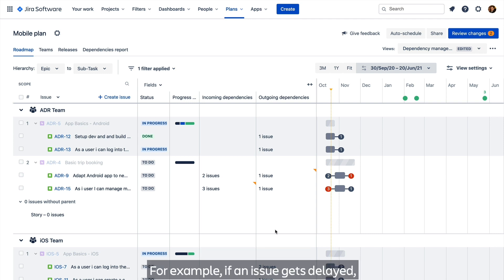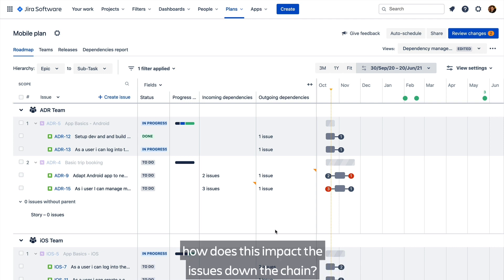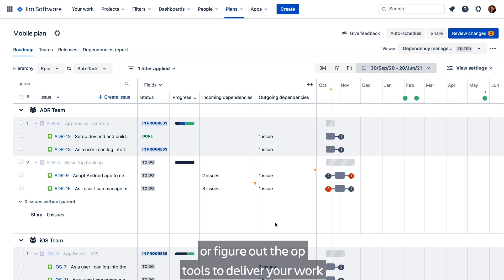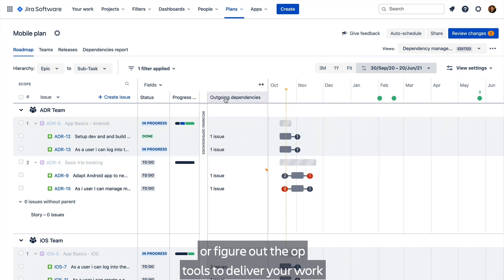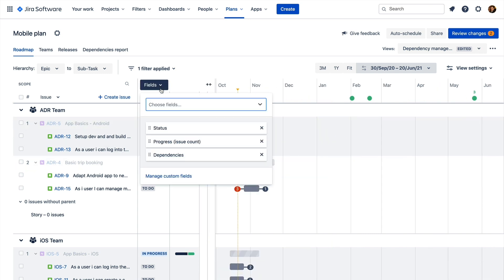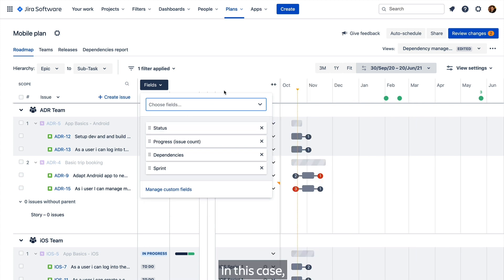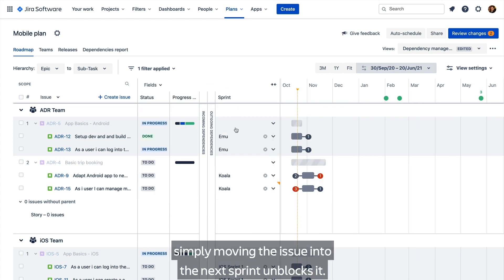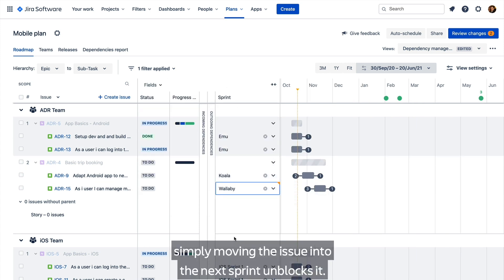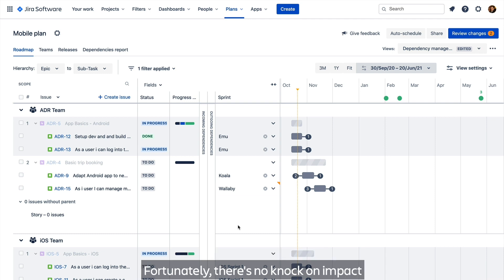For example, if an issue gets delayed, how does this impact the issues down the chain? It helps you understand the potential risks or figure out the optimal delivery of work to resolve dependencies early. In this case, simply moving the issue into the next sprint unblocks it. Fortunately, there's no knock-on impact on any other blocked items.